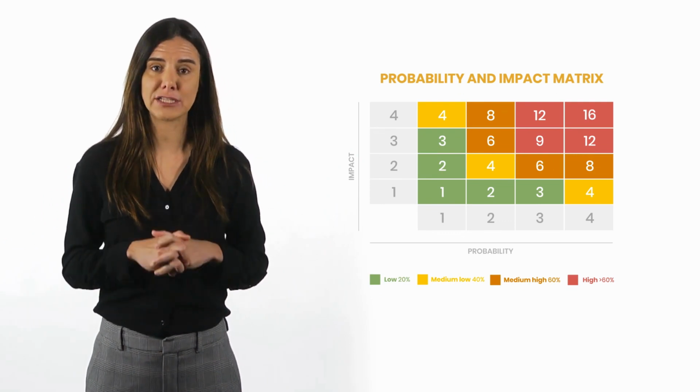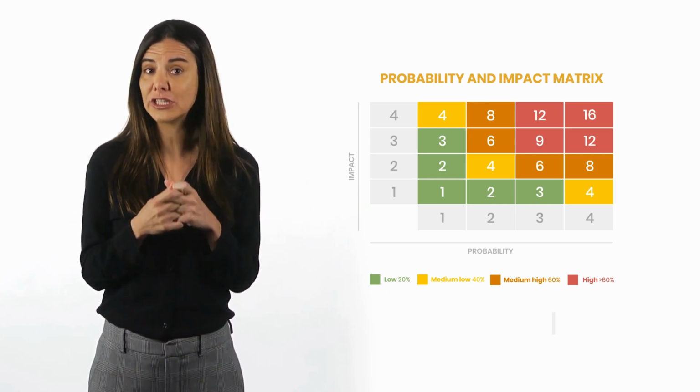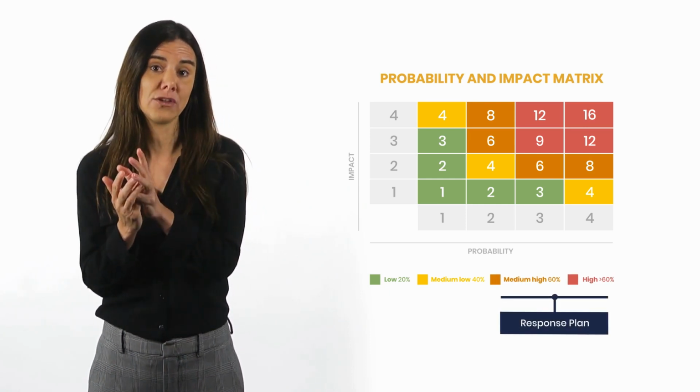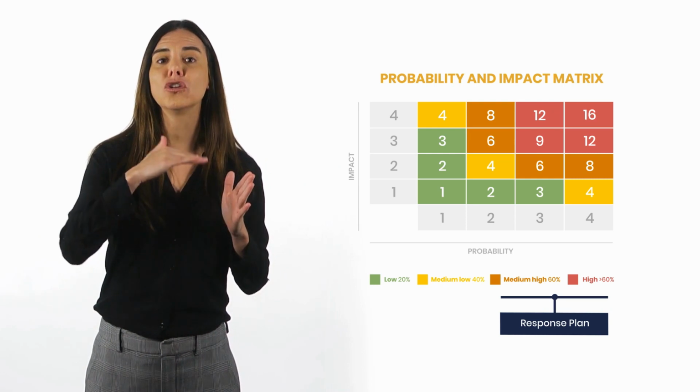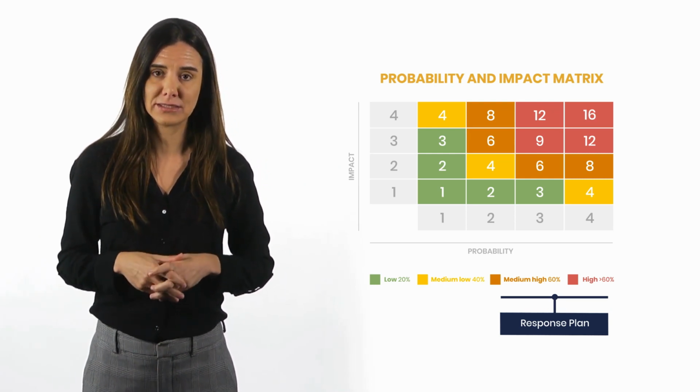As part of our response planning exercise, we'll carry out a cost benefit analysis for each prioritized risk, which will ensure that the cost of managing the risk is less than the cost of its impact if it were to materialize. Let's imagine the following situation. We've identified that the person responsible for procurement management in our project doesn't have much experience with large procurement processes, and this could generate delays and deviations in the management of our annual objectives. Among the many possible responses, we've identified one which involves hiring a company to be responsible for all procurement processes.